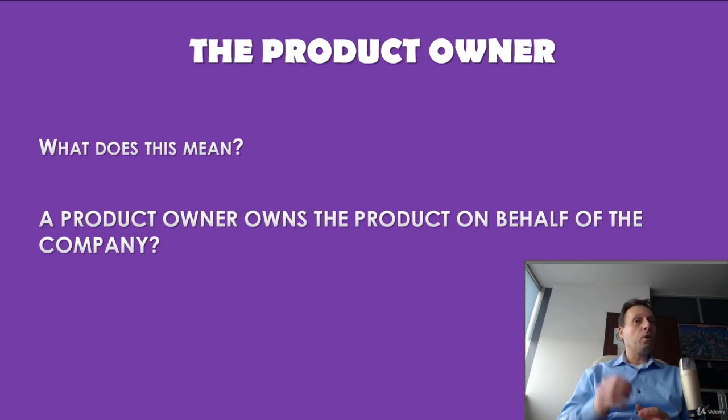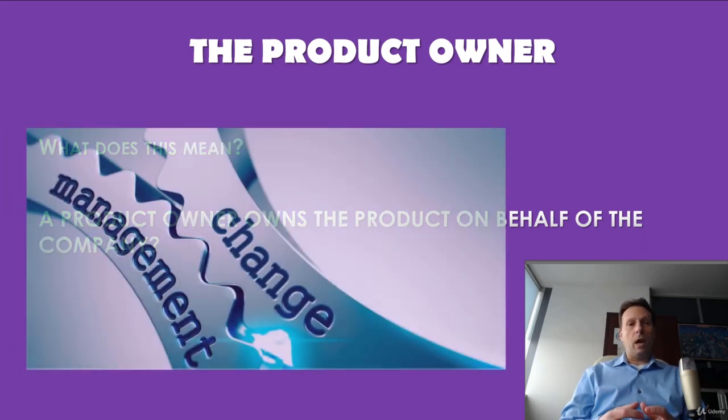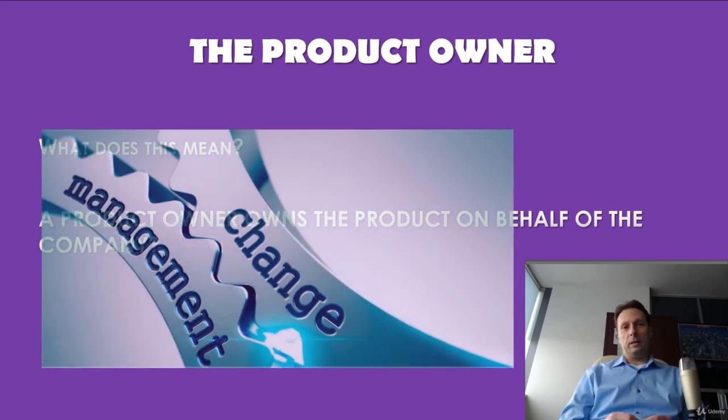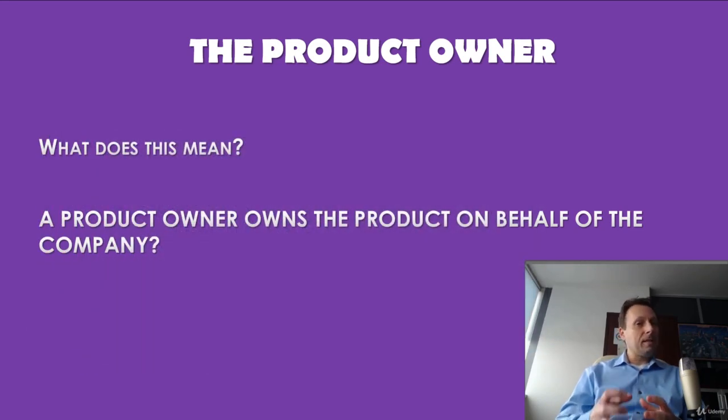The product owner commits to not throw new requirements at the team during the current sprint. On the other hand, requirements are allowed to change and the change is encouraged, but only outside the current sprint. Once the team starts on a sprint, it remains focused on the goal of that sprint.